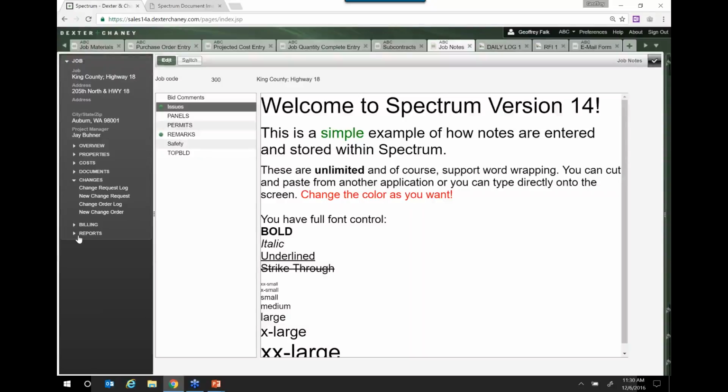So I'm looking at some of the questions that have come in. One of the questions: using quantity complete, will this generate invoices for the period? The quantity complete that I looked at in the cost section, this is your finished production quantities. For those people that build roads, work for the state DOTs, you know that you've created 20 miles of freeway, but the state inspector comes out and says, well, we're only going to pay you for 15. Because there's a lag.